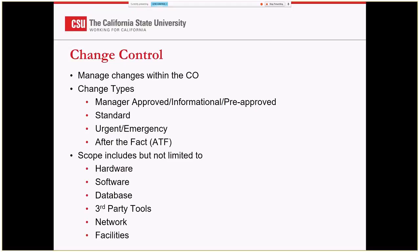That's where the change advisory board comes in. We have representatives from the various departments, infrastructure, information security, and everybody gets a chance to chime in. Those urgent slash emergency changes fall under the category where someone wasn't able to present their change request during the time to review, but it really needs to be done in the next 48 hours.